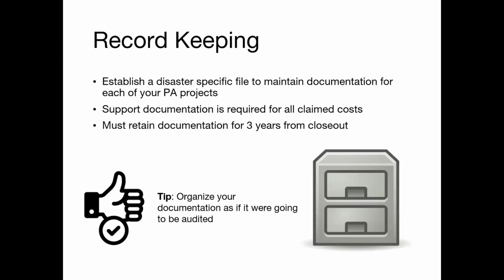Documentation must be retained for at least 3 years from the day your account with HSEMD is closed. We recommend organizing your documentation as if it were going to be audited. You'll want to establish a disaster-specific file to maintain documentation for each of your PA projects and include all supporting documentation for claimed costs.